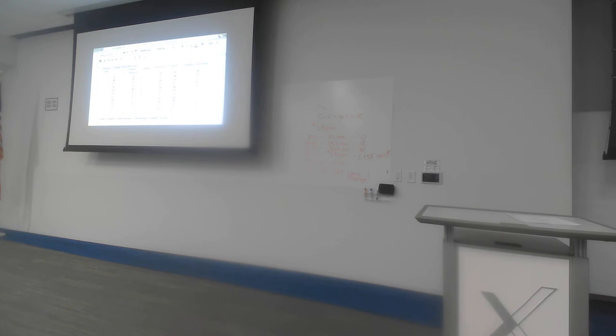Option number two is, again, if I look at my project network diagram, and rather than crashing J, if I pick one activity on each of the different paths and crash them both simultaneously, then that would have the same effect. So for instance, if I were to crash activity B, which is on this lower path, and activity E, which is on the original critical path, and if I was to crash them both simultaneously, the effect on my project paths would be similar. And again, I'm just going to focus on those two paths. So E is on the first, our original critical path, and so that would reduce by one day from 15 down to 14. And B is on this new critical path, so that also would reduce from 15 down to 14. And so therefore, the overall project duration would reduce from 15 down to 14, and I would get my extra day's bonus. So that's another option.